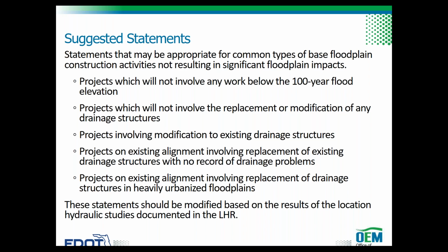projects involving modifications of existing drainage structures, projects on existing alignment involving replacement of existing drainage structures with no record of drainage problems, projects on existing alignment involving replacement of drainage structures in heavily urbanized floodplains. These statements should be modified based on the results of the location hydraulic studies documented in the location hydraulics report.